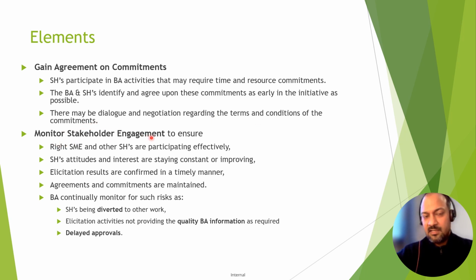Monitor stakeholder engagement. Do remember this is an important topic or part of the element here. Monitor stakeholder engagement. Any question could come in a scenario based. So why do you monitor stakeholder engagement? It's important to ensure that the right subject matter experts and other stakeholders are participating effectively. Stakeholders' attitudes and interests are staying constant or improving. Elicitation results are confirmed in a timely manner. Agreements and commitments are maintained.